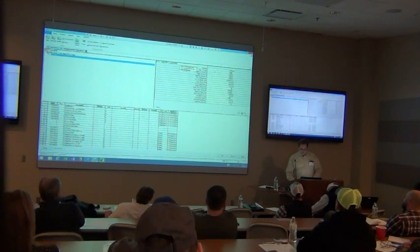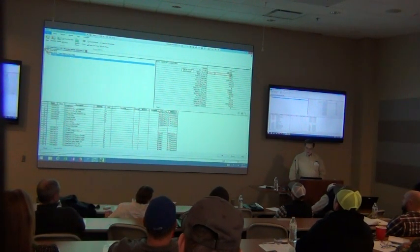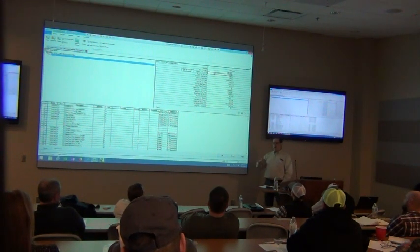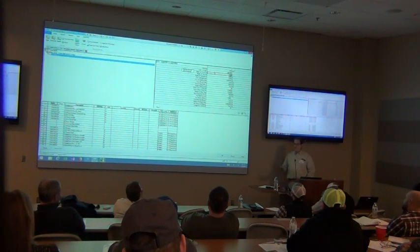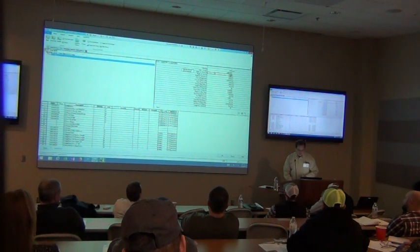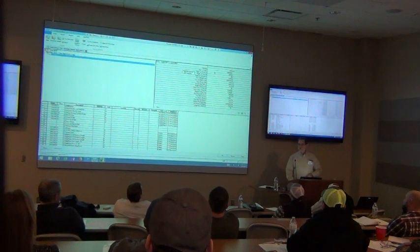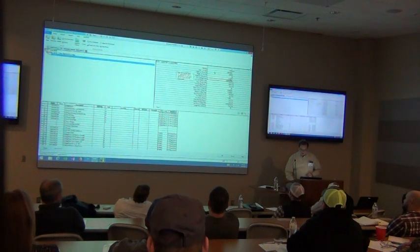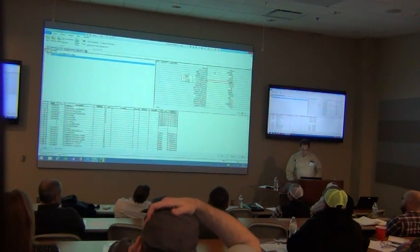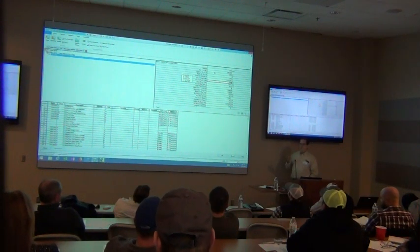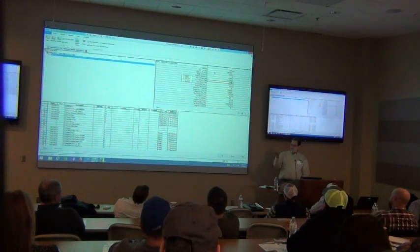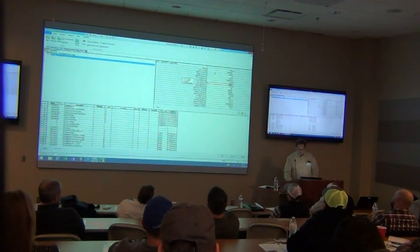Going through the assembly walkthrough: I can enter the square footage of the slab. Right off the bat, there's a reminder — do I need gravel? Do I need sand? Am I going to have to put something under it? So instead of just taking off the concrete by itself, the questions start going: what about this, what about this? I'm going to say I need four inches of gravel, but I can always say zero — I don't need any sand underneath. I can go through and answer the questions as I see fit — the strength of the concrete, the different types, and so forth.